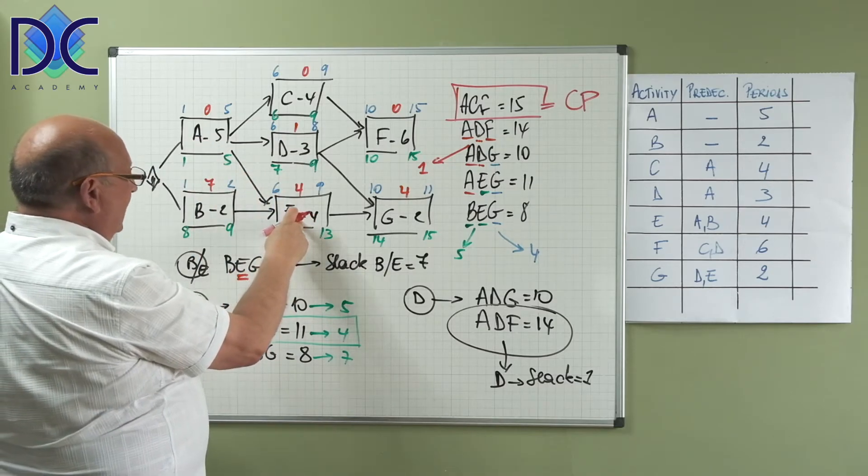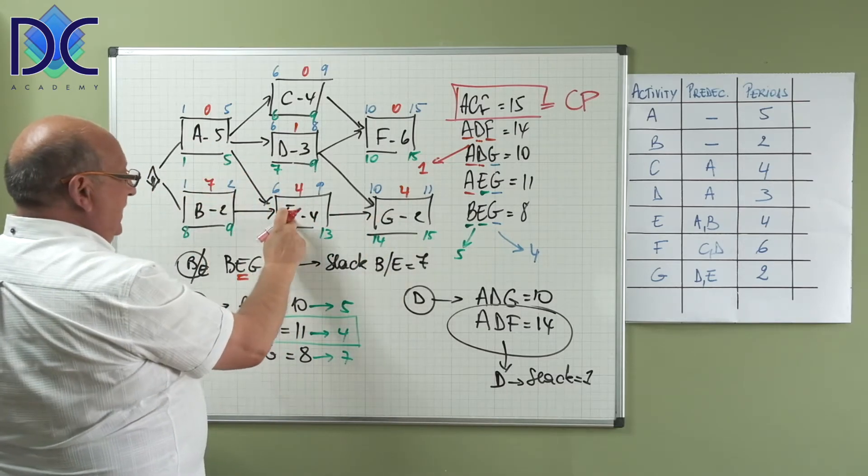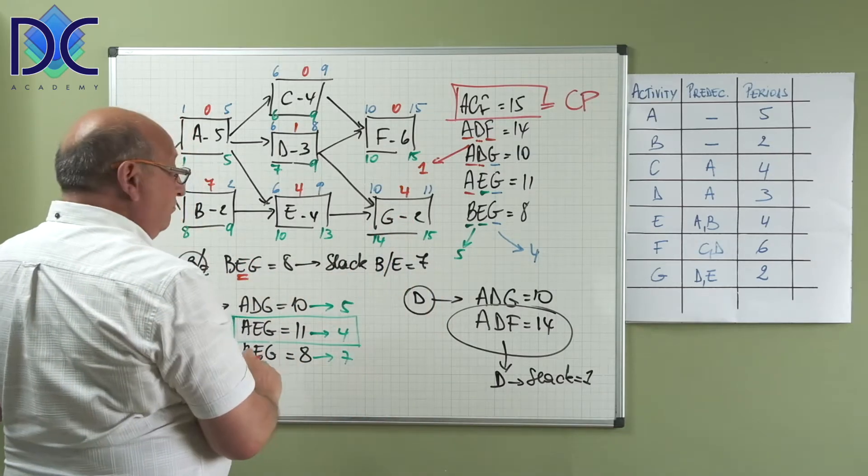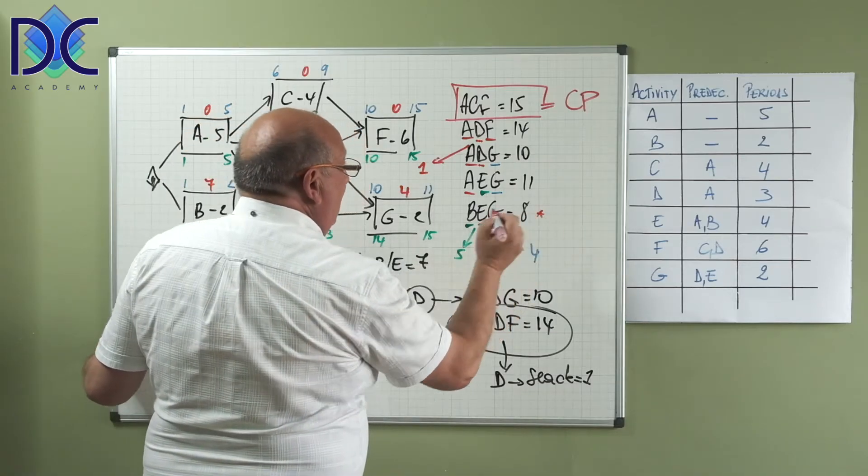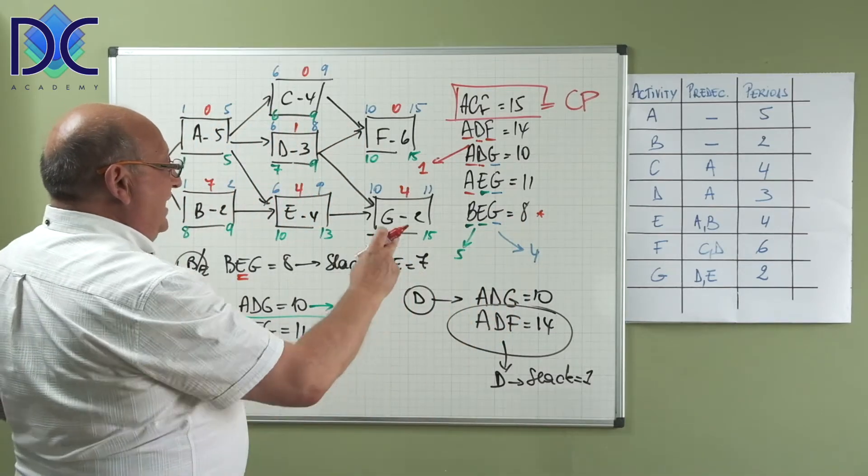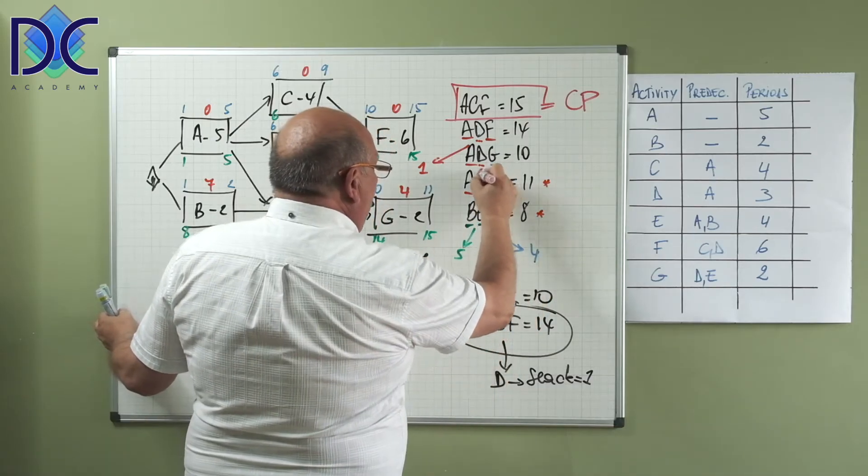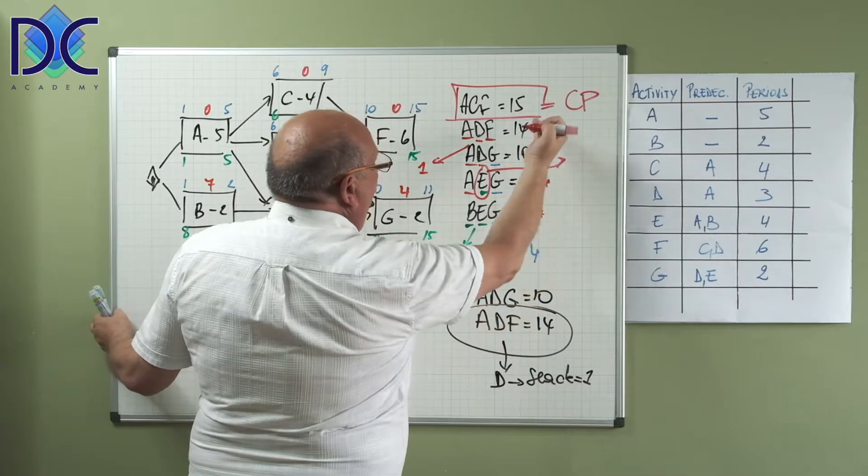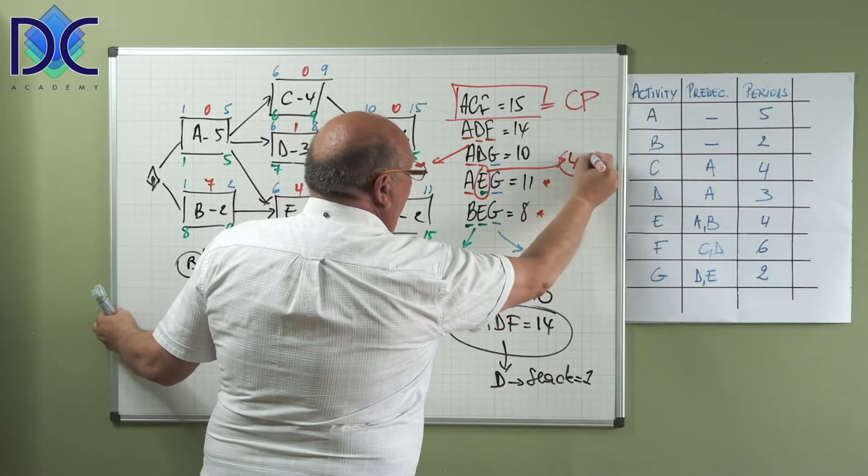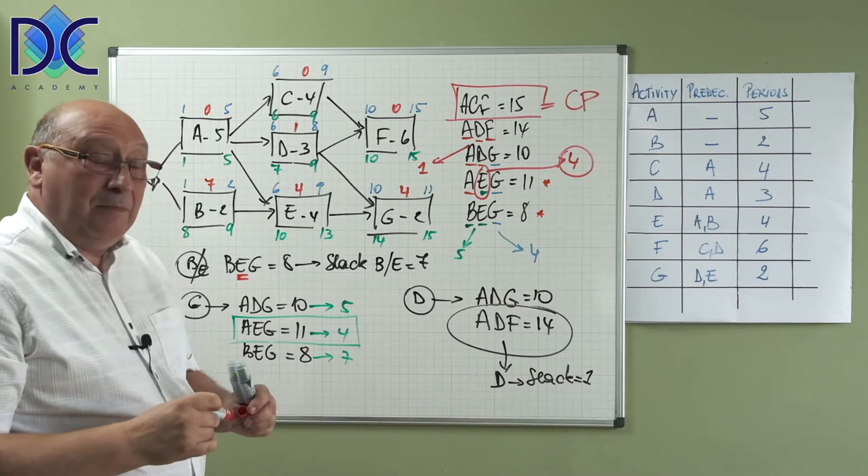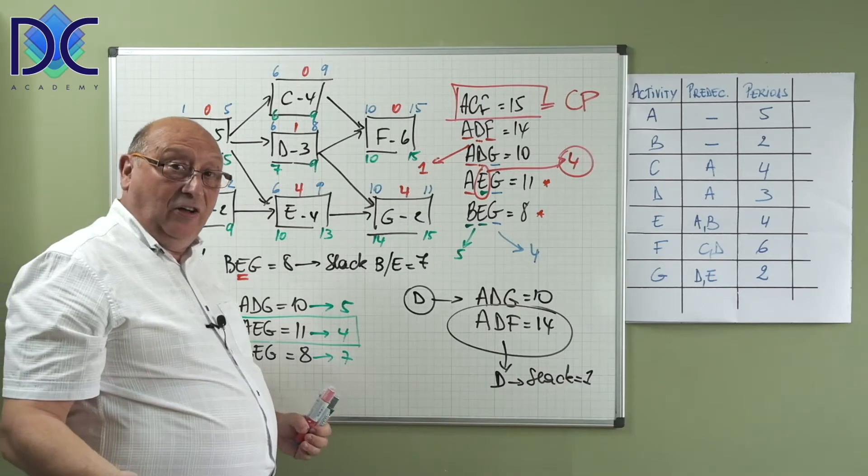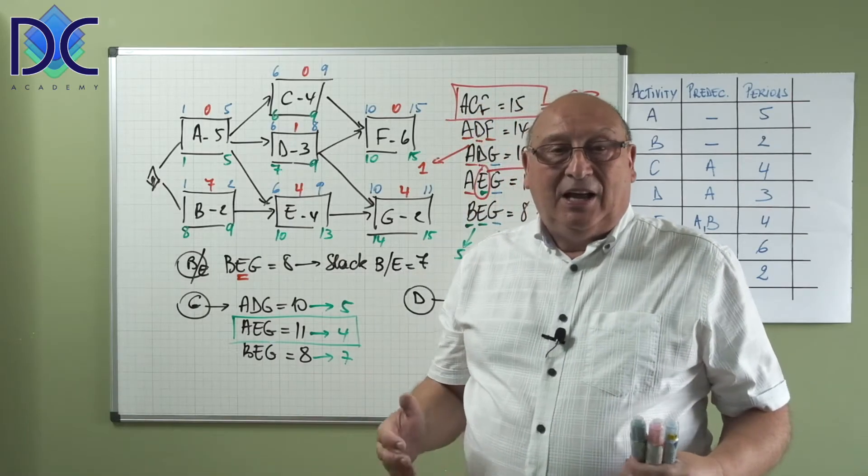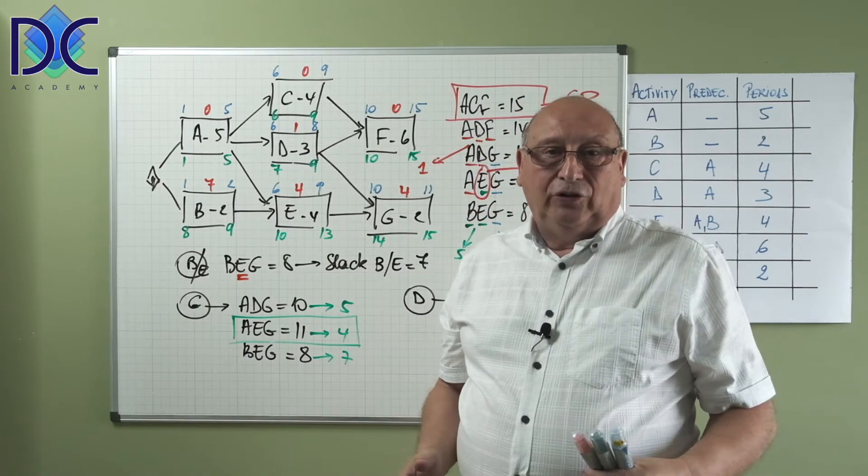I must say that I made an error here for E because E is on two paths, E is on AEG and BEG. When we take BEG we have 8, when we have AEG we have 11, so basically E has a slack of 15 minus 11 is 4. So basically I made some error there, but I found it. Working on the board, it's not always the same as working on the table.